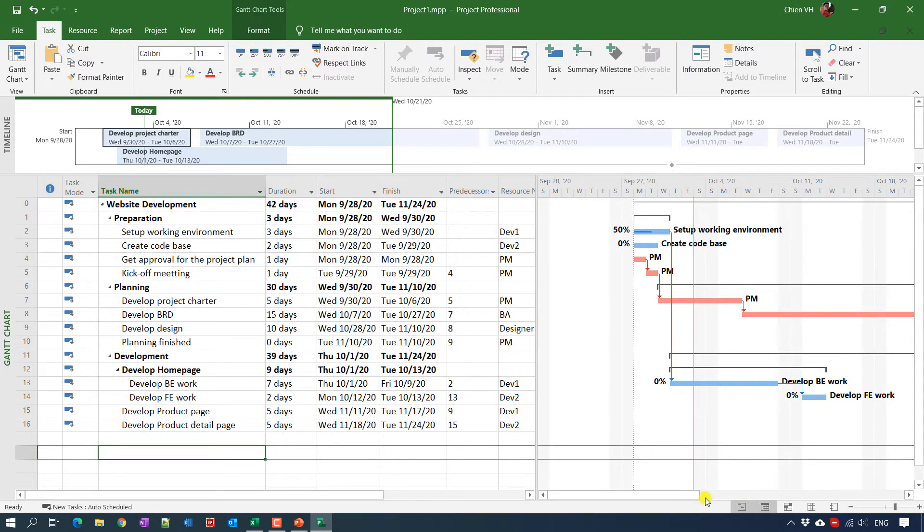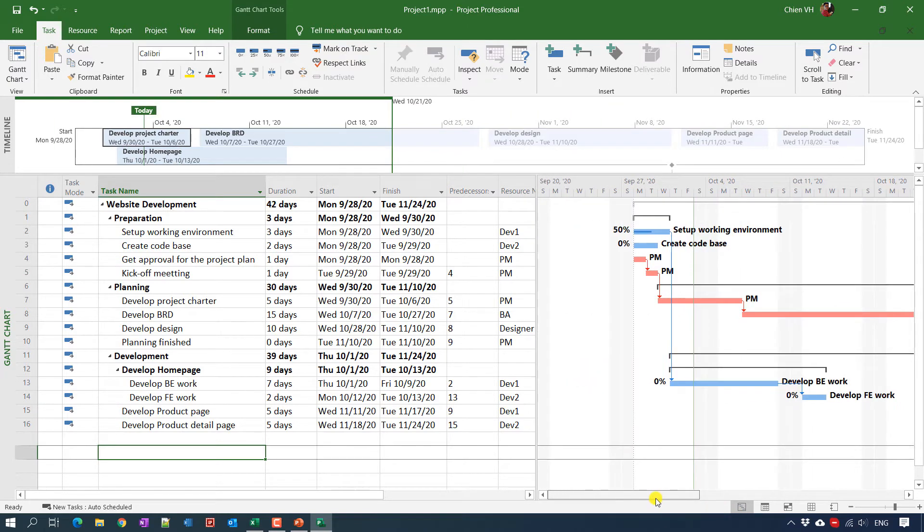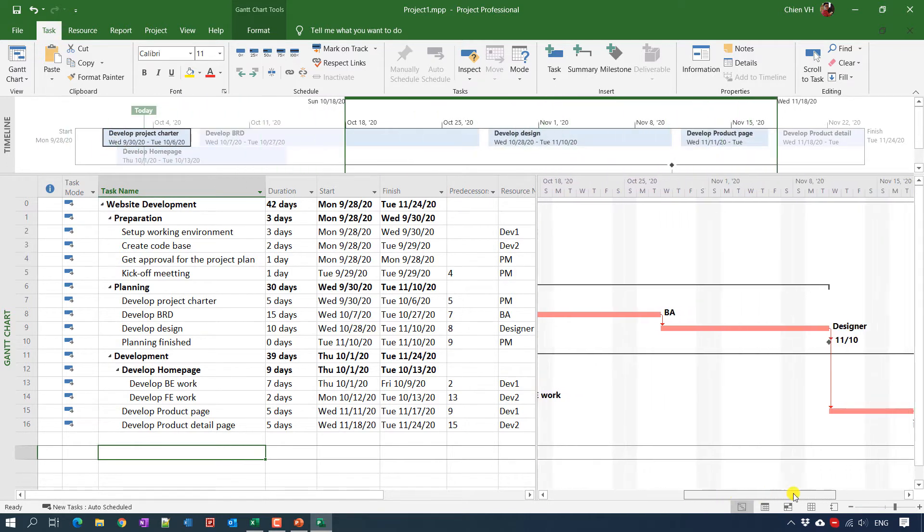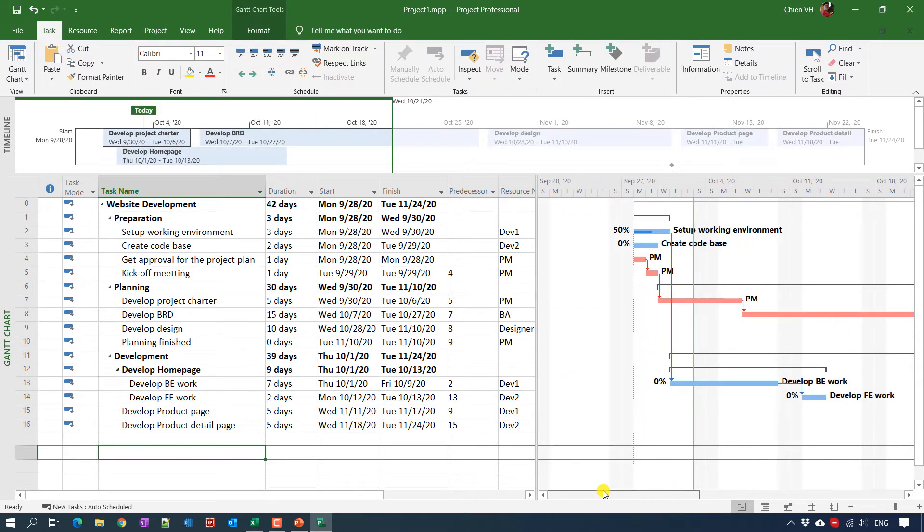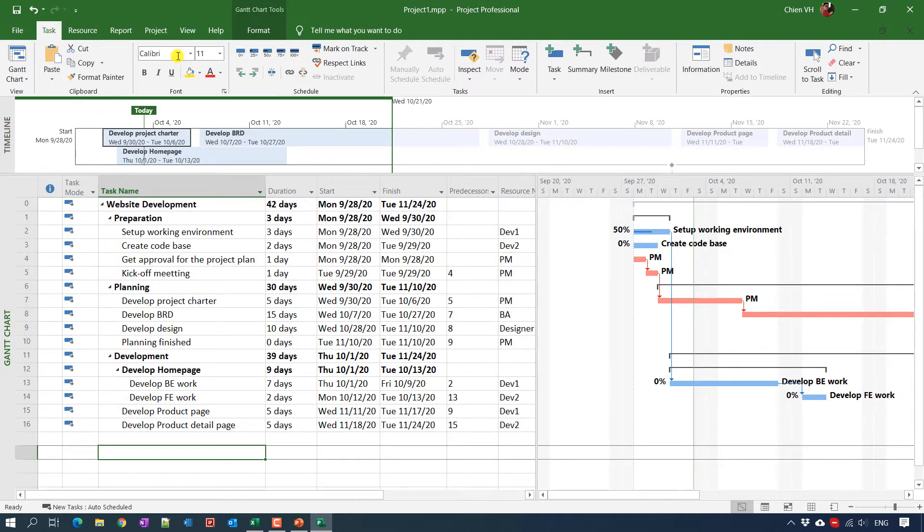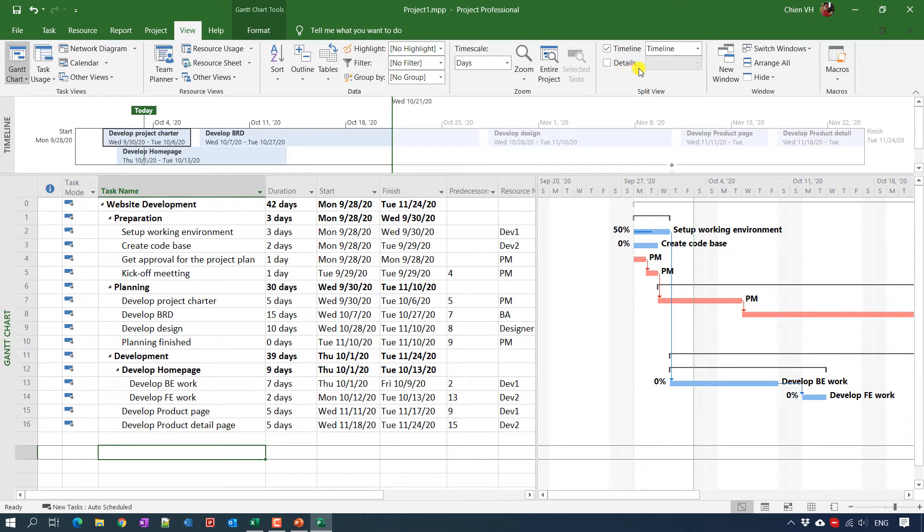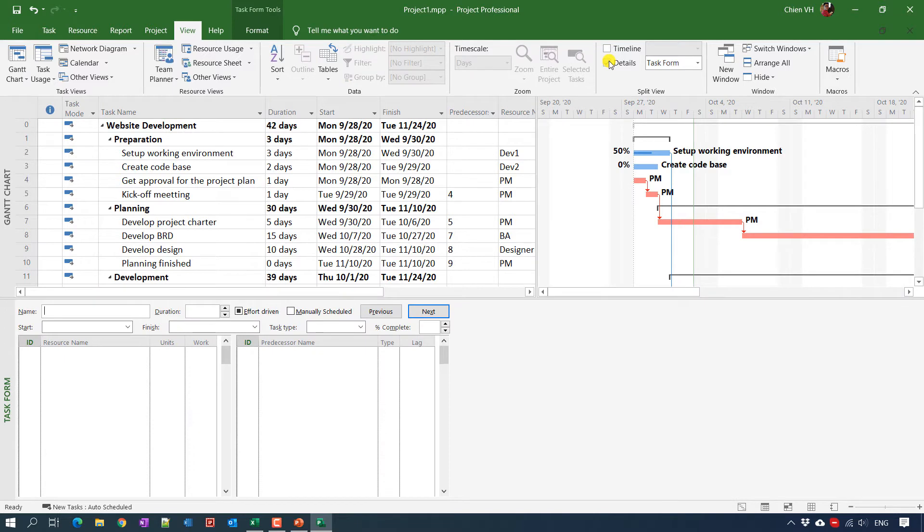So for example in my project plan I have the planning finished milestone. Let me add it into the timeline. You see here. And in the timeline you can see the overall project status day by day, you can see which tasks behind or ahead of schedule. So in case if you want to look more detail, I mean for more specific tasks here, you can take a look into the task list and the timeline or also even in the Gantt chart. You see here we have timeline and Gantt chart display at the same time, we have two views.